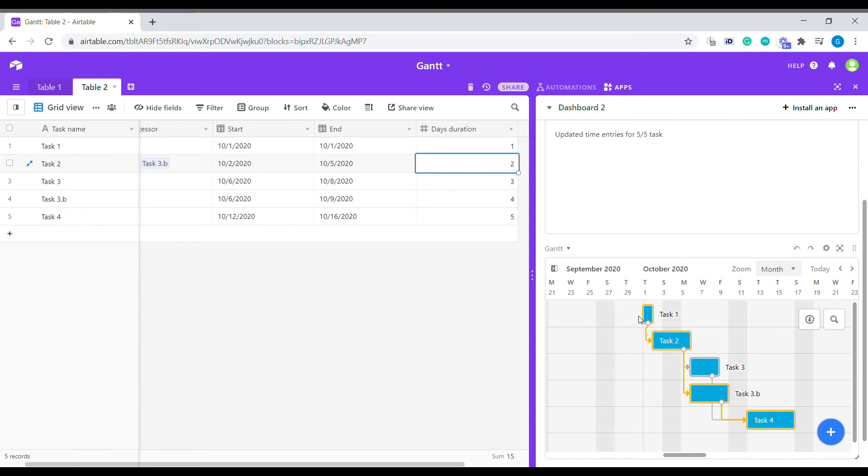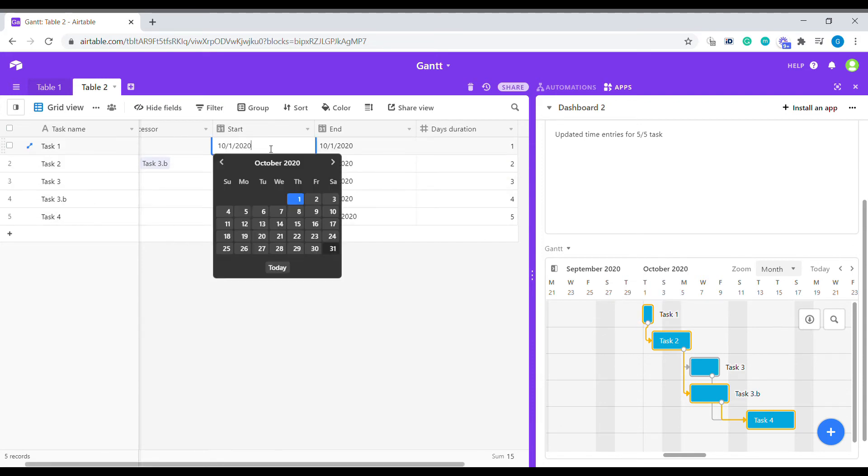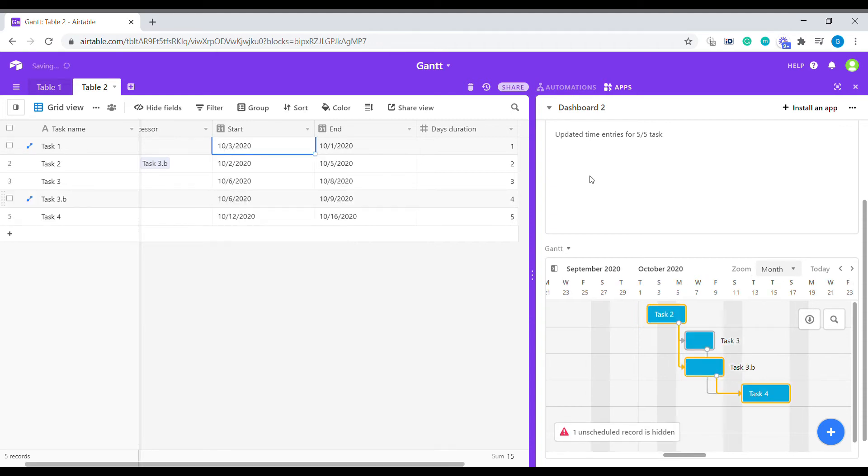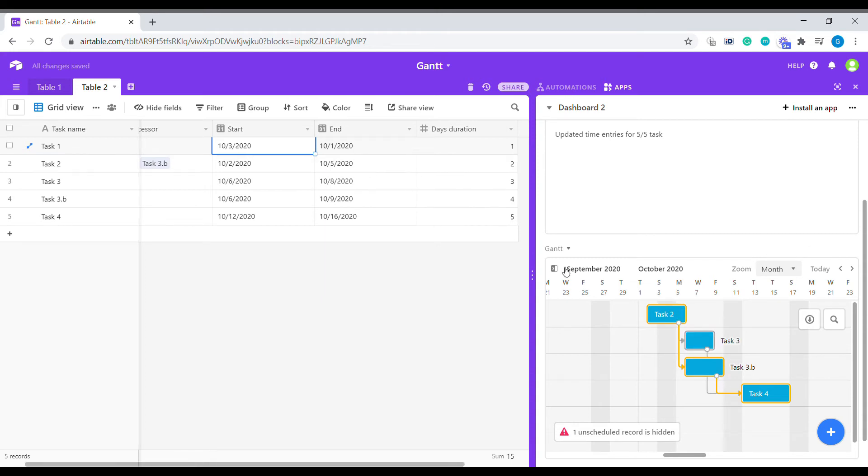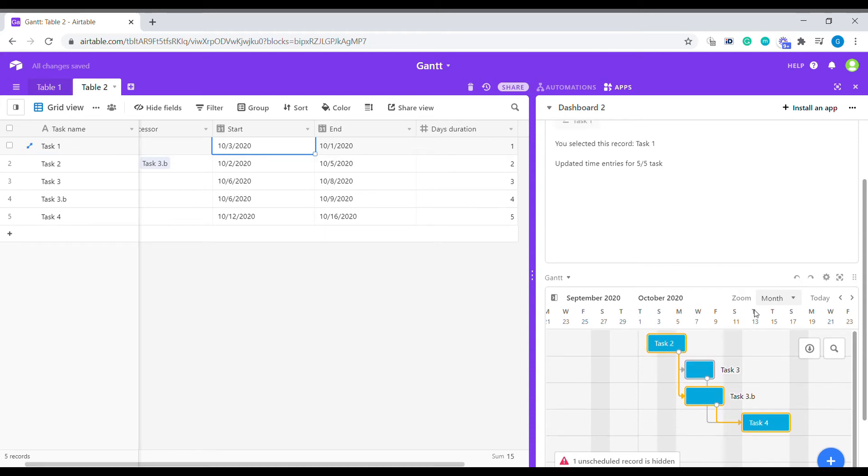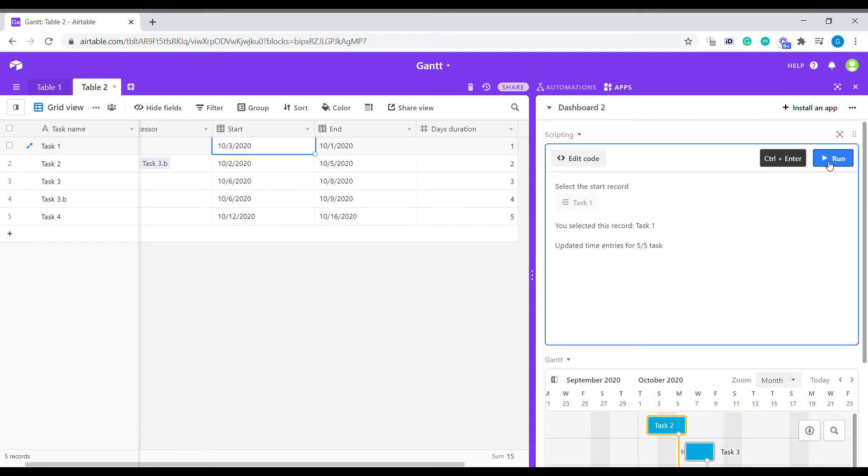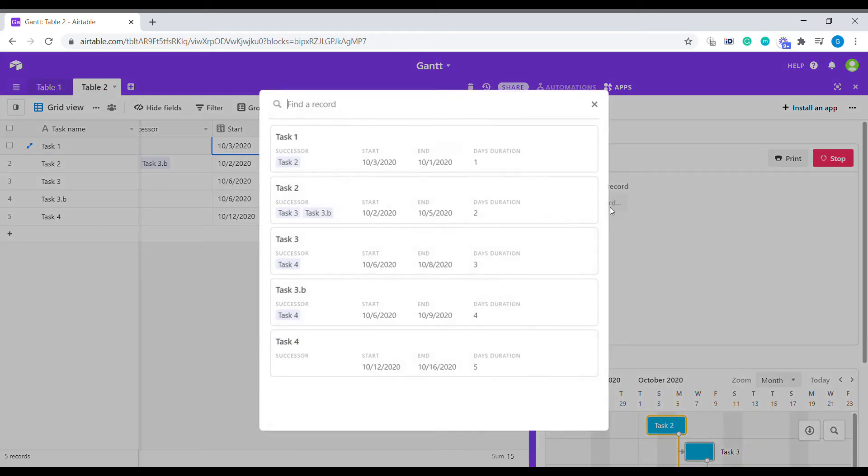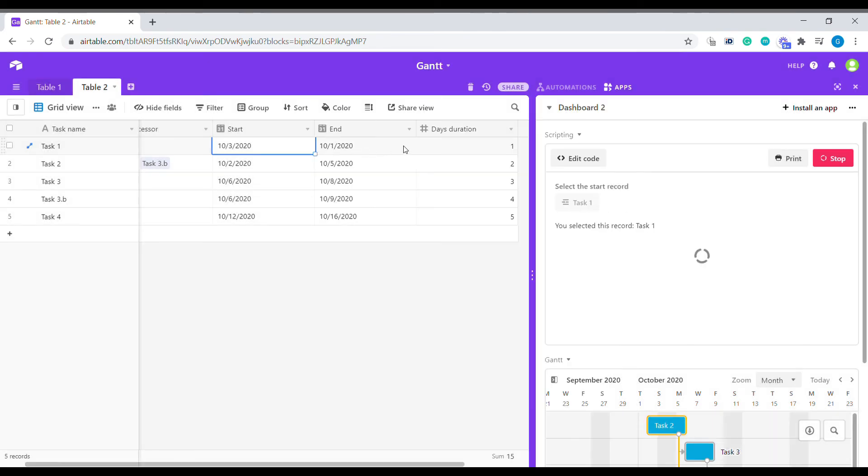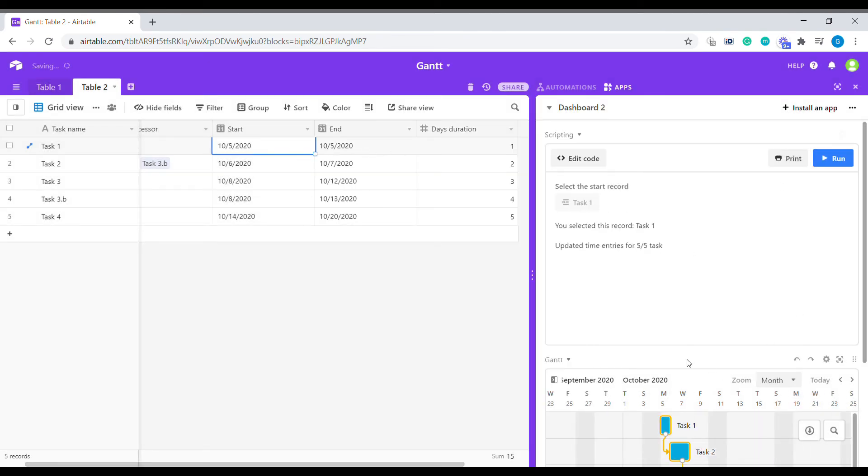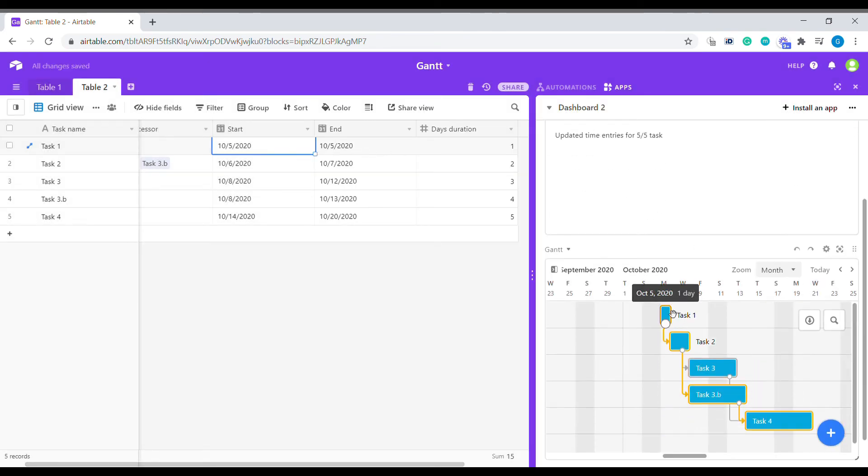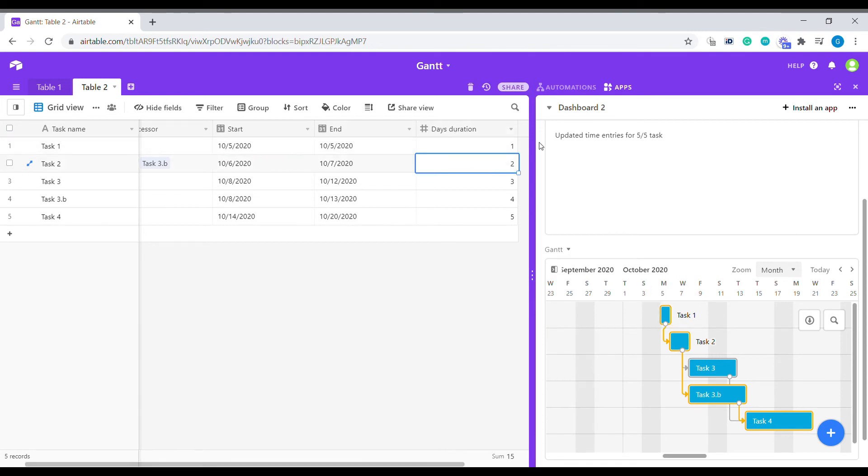You can also see that if we schedule this task on, let's say, Saturday, it would not start on Saturday. The script would move it. So let's start from task 1. You can see that the script has actually pushed it to the first working day.